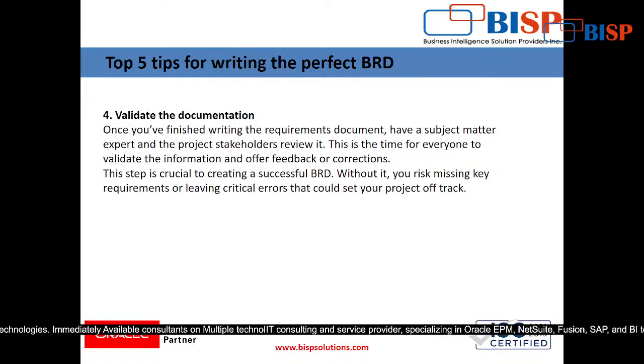Validate the documentation means once you have finished writing the requirement, have a subject matter expert and the project stakeholder review it. Whenever I write something, it is very mandatory to get it validated from your higher senior authority. Same thing is there. Whenever I write a project business requirement document, it should be validated by the project stakeholder.